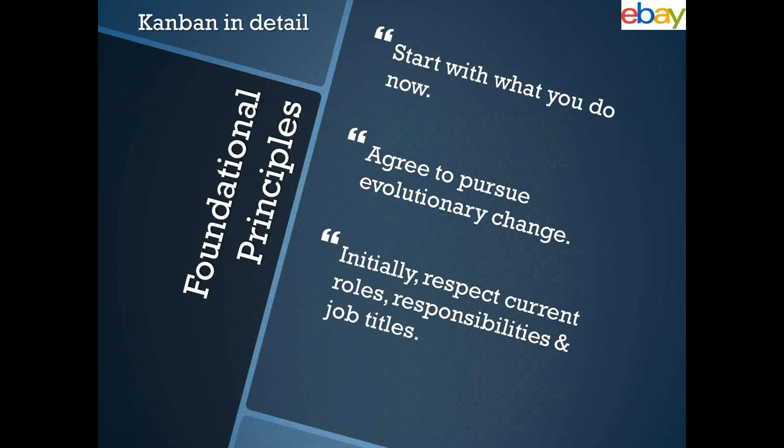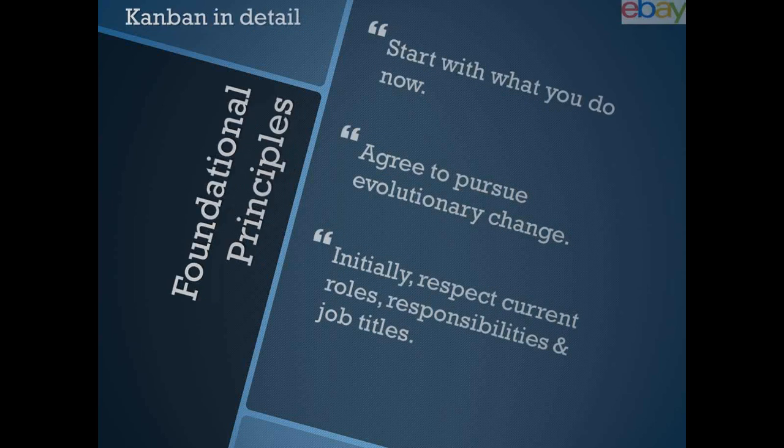What are the foundational principles of Kanban? Start with what you do now — even if you don't have all the information, start with whatever information you have. You have to agree to evolutionarily change, so you don't wait for everything to be perfect. You go with an understanding of what you have now, and as changes come to the product, you agree to take up changes while respecting the current roles and responsibilities of a PD, PM, or QE, though that's not enforced.